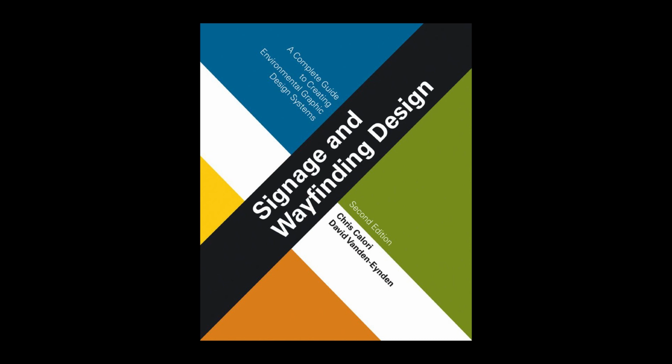During Phase 3, a complete inventory of all the signs in the program must be developed, meaning that each and every sign must be located, messaged, typed, and assigned a unique identifying/tracking code. This sign inventory process is essential because the EG designer cannot meaningfully proceed with the design of the visual aspects of the program until all the particulars of its parts are known.